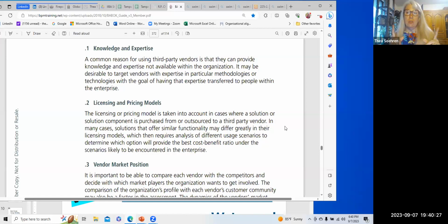You may only have access to those fields up to a certain level, say 500 a month. What's going to happen if you need 600 a month? Or if one month you're doing your implementation, you need 10,000? What are the pricing levels? And you need to be aware of that, because whenever you're doing development and you're talking about bringing in data, you need to be able to say, we're going to do a test batch of this, knowing you're not going to go over your licensing agreement levels. You're not going to be penalized. You're not going to have a higher rate, things like that.